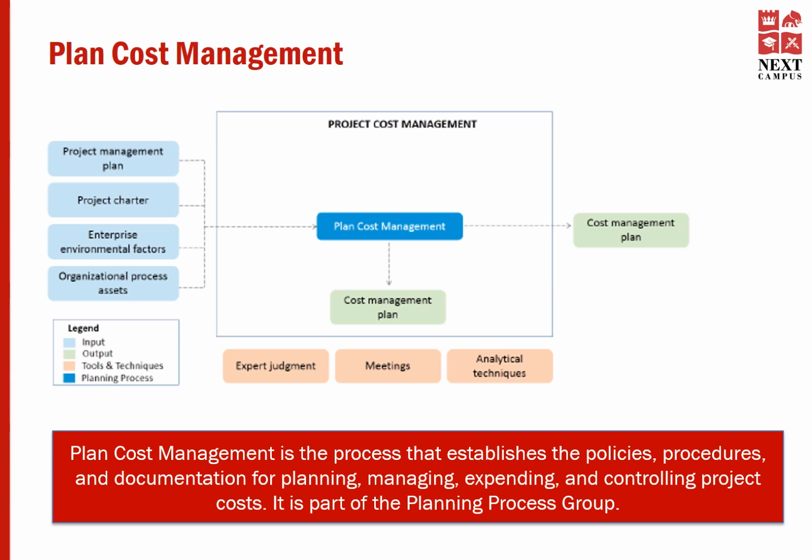Several analytical techniques may be used to determine the cost management plan. These techniques help to map the impact of various decisions on cost. For example, how do risk management processes impact cost, etc. Cost management plan is a primary output of this process. It establishes the units of measure, level of precision, organizational process links, control accounts to be used, rules for performance measurement, frequency and methodology of monitoring, and various other details that lay the overall framework for cost.